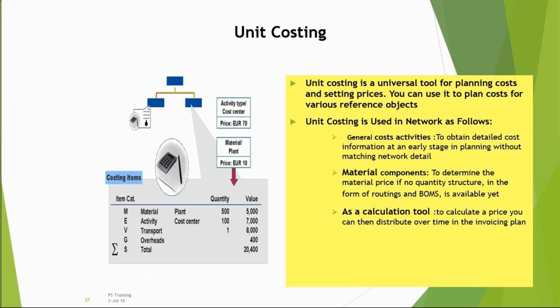So overheads, will they also be captured under the general cost activity? No, not in general cost activity. Whenever I'm doing my period closings, actual overheads will get captured over there. My planned overheads will be captured through my profiles. In configuration, I will be defining the profiles, and if the cost is 100 units, 1% of the cost will be treated as an overhead, or 2% of the cost, whatever it is. This is how my planning will occur.